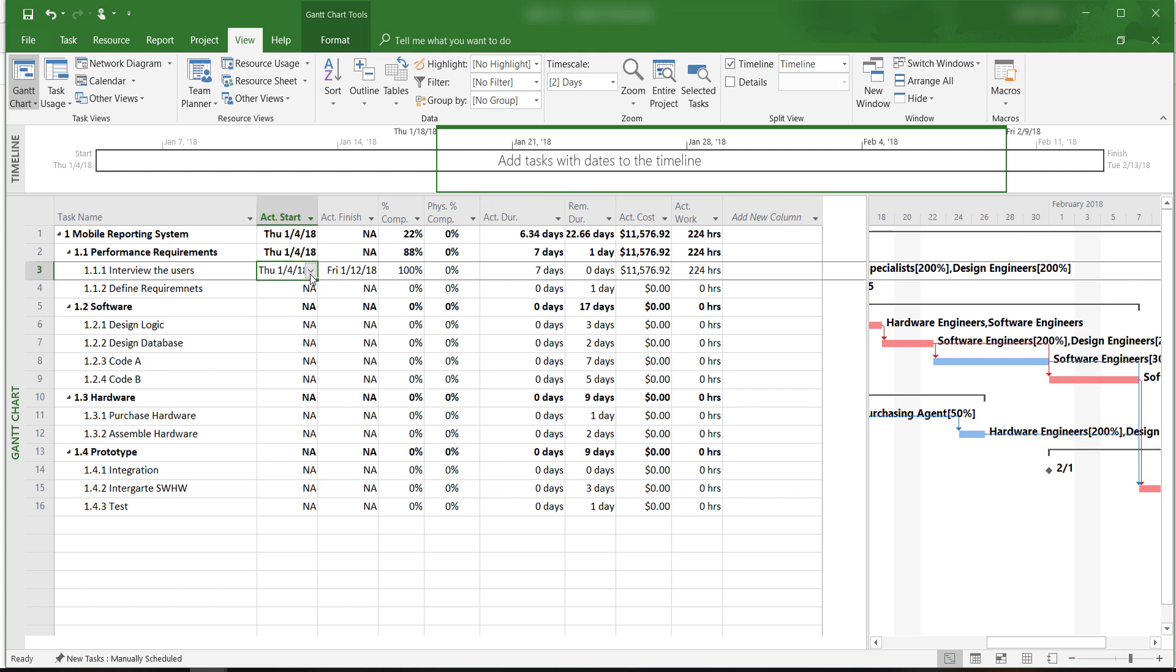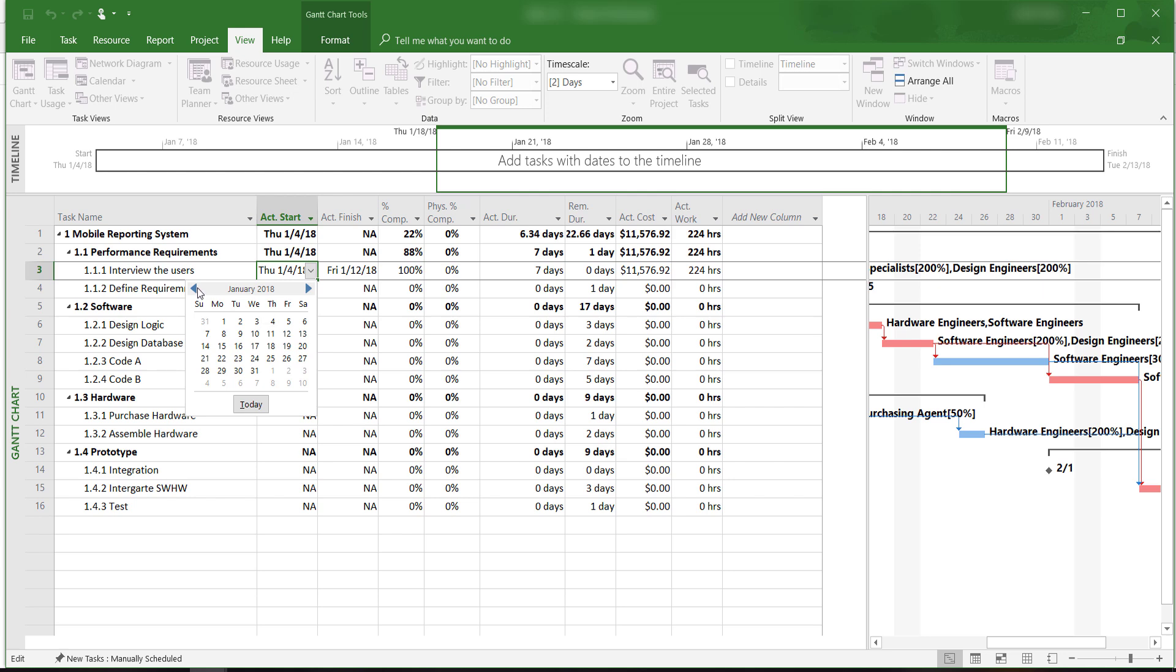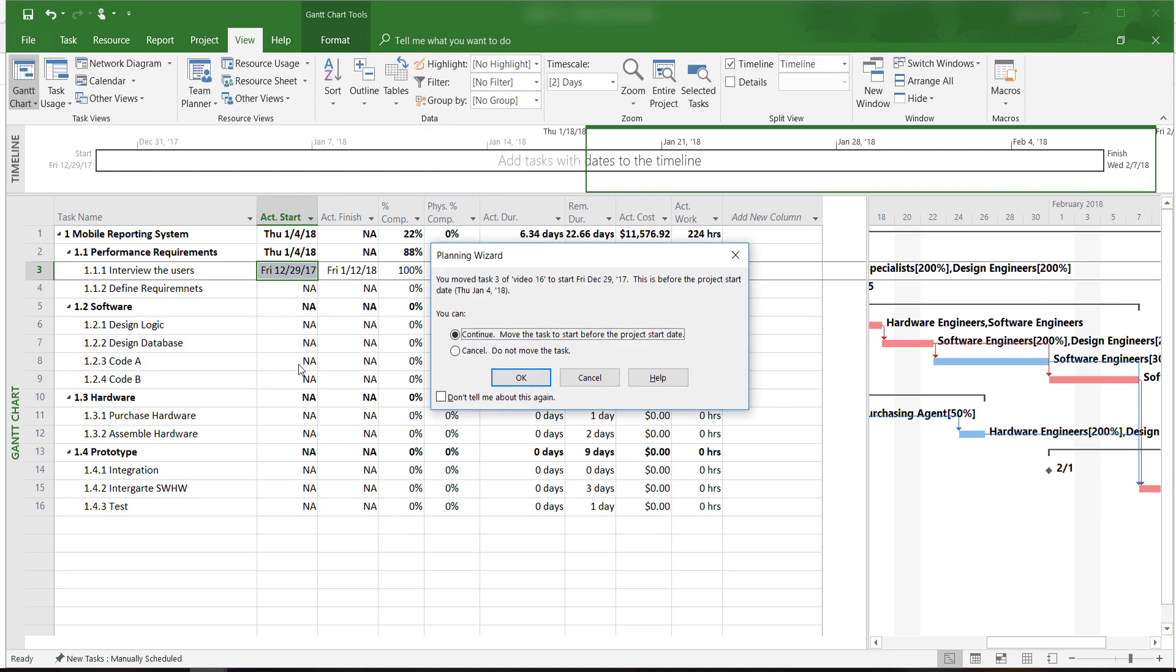Let's say that instead of starting on January 4th, we actually started on December 29th. Our warning shows that we started the task ahead of schedule, even before the project was planned to start. This is fine with us, so we click OK.